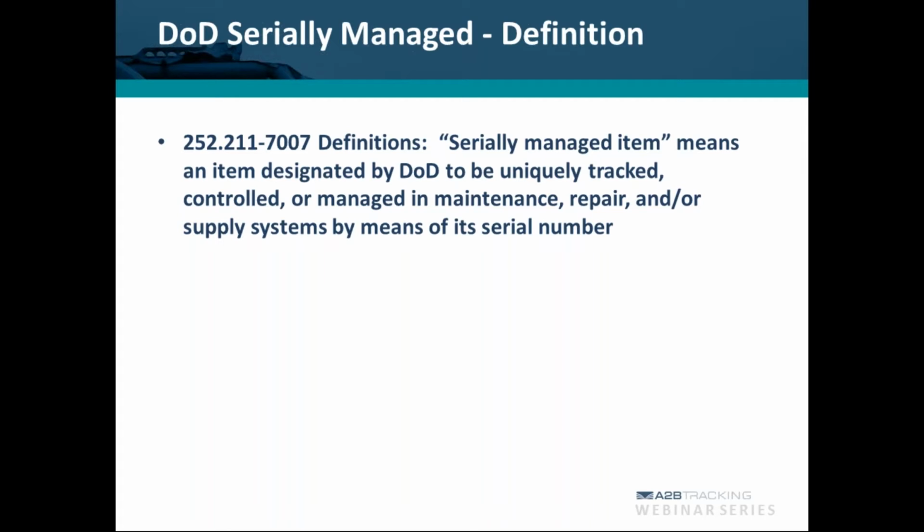Consumed or expended reasonably or properly or otherwise accounted for in the performance of the contract as determined by the Government Property Administrator, including reasonable inventory adjustments, or if it's been disposed of. If it's transferred to a follow-on contract, that too is a reportable event.